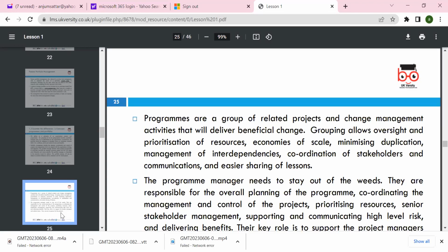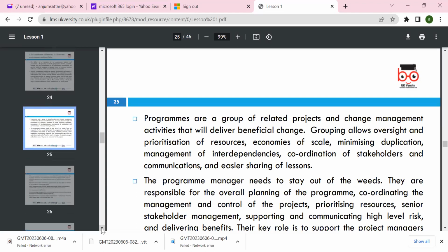We have to involve the stakeholders in the planning stage. For example, we have a company that wants to get gas from fracking, by drilling into the ground and getting the gas out, so that's drilling technology. Then a lot of stakeholders objected because some research says earthquakes can happen in those areas, and there were a lot of protests in the local area, and it took ages. If they had informed them earlier and discussed the pros and cons, it would have been good to involve the various stakeholders.